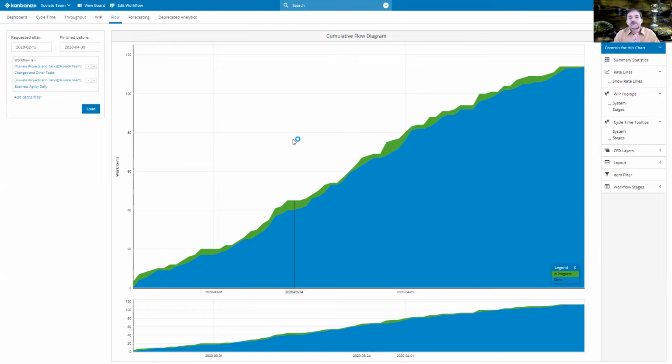What is this? A cumulative flow diagram shows us time on the x-axis, and then on the y-axis, we've got the accumulation of work items. And any date, we can see how many work items have been done from the beginning that we started to measure. And we can see how many items have passed the in-progress line. As such, it's not really usable. And I also said we can read off all our variables. So let's do that. And now we can see that we've got 6 items in progress on the y-axis. And the average time for that was 1 day, 3 days, 2 days. What we can also see is our arrival rate in green and our departure rate or throughput as the slope of the respective 2 lines.